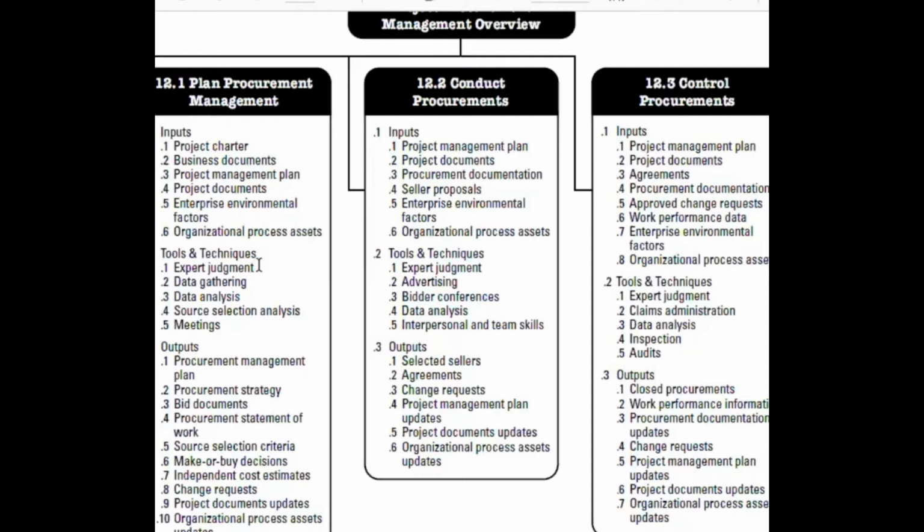Let me take you a little back. On the first day when I was explaining to you guys that you will have many projects to start with, based on the business requirement, you will select a project, maybe option A, option 2, option 3, option 4. So based on those requirements, which is your business case, you will be able to produce the project procurement statement of work, which contains all the work which you want to get done from the seller or executing organization, which means we are giving a contract to the seller, and with that we are providing them the documents.